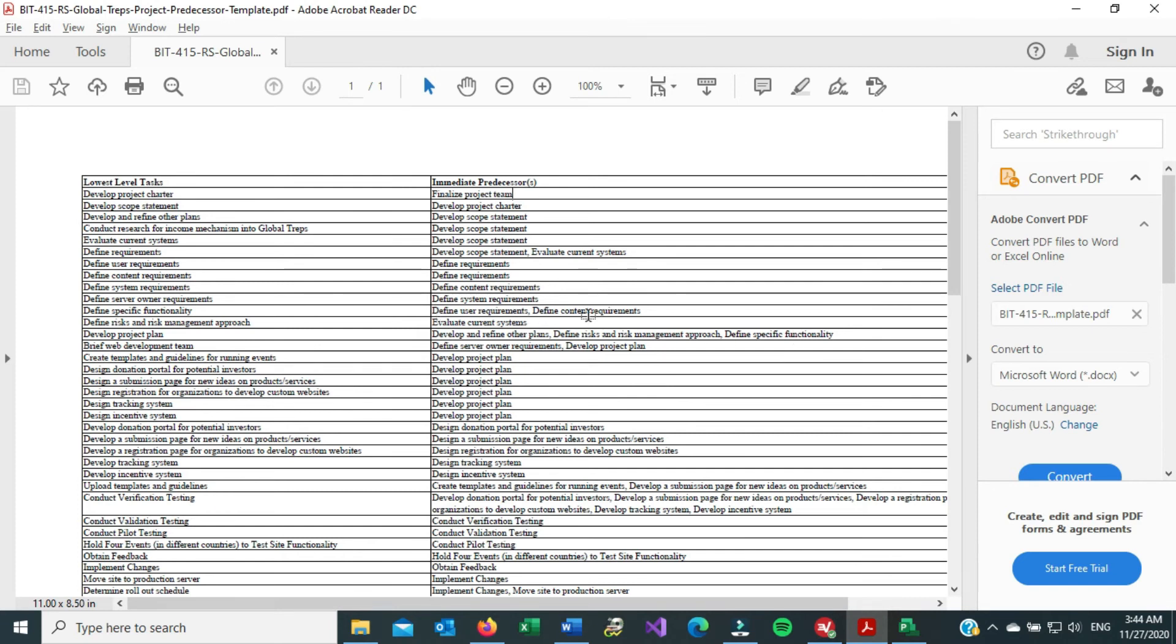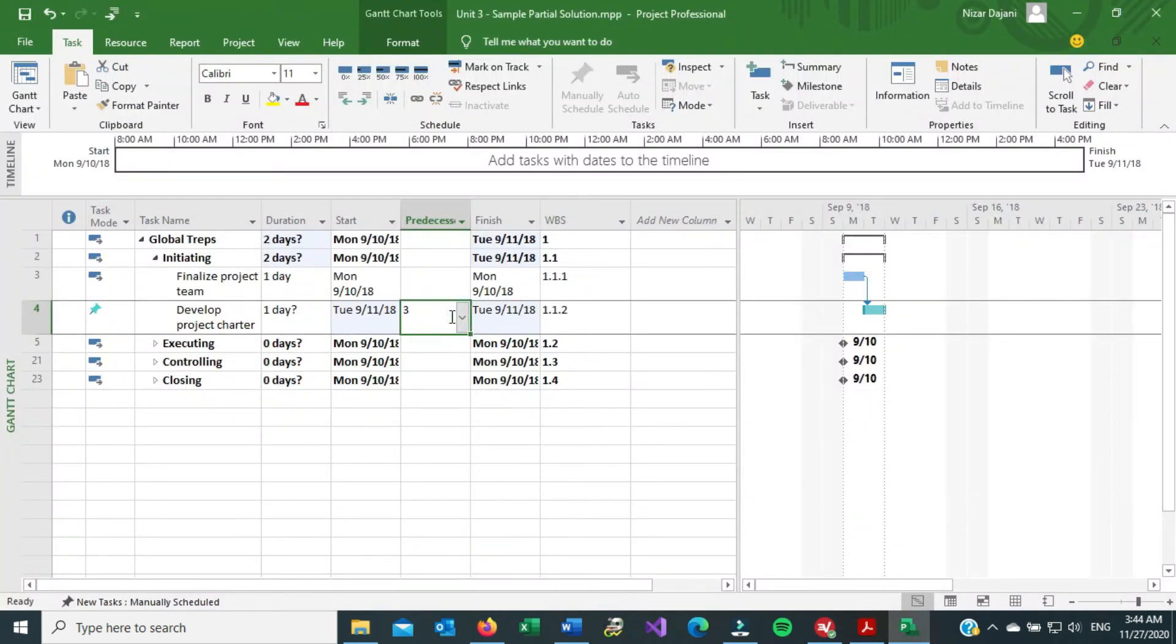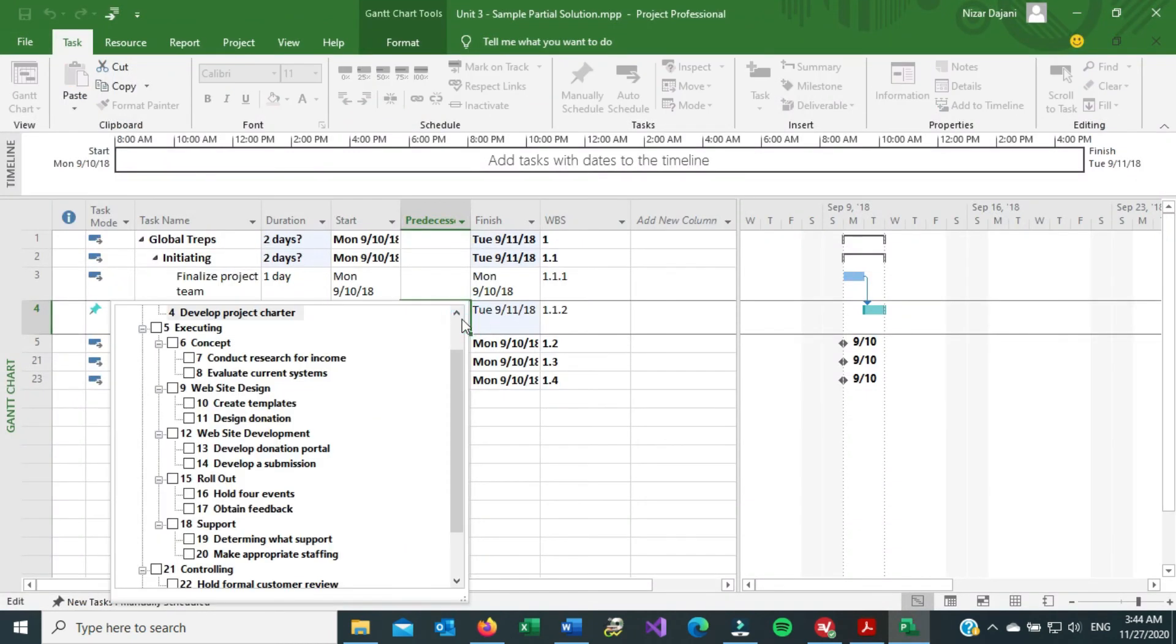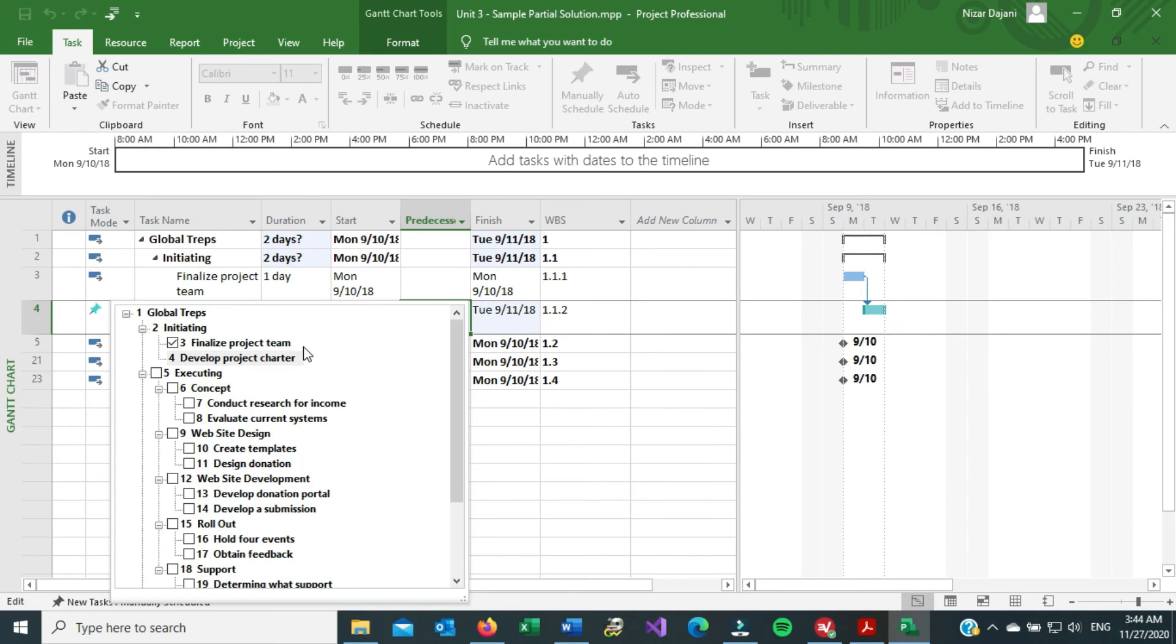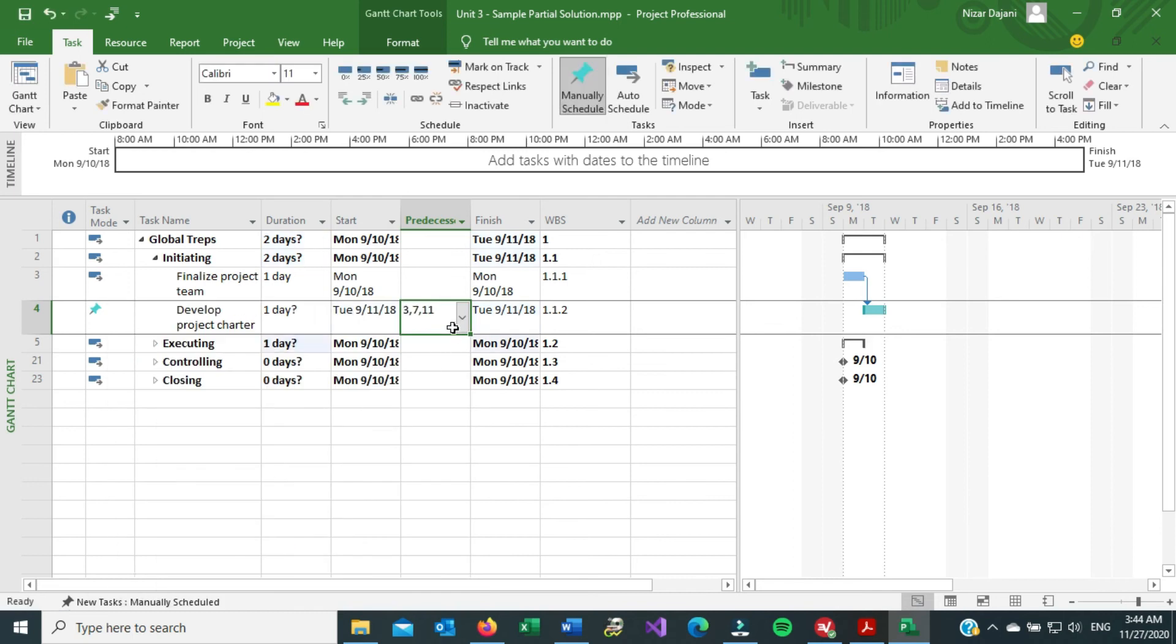So the way to add multiple predecessors is, again, this is not the right place to do it, but just as an example, just like I clicked on box number three, you can click on box seven, you can click on box eleven, and then just escape out of it, and then now you have all of them listed.